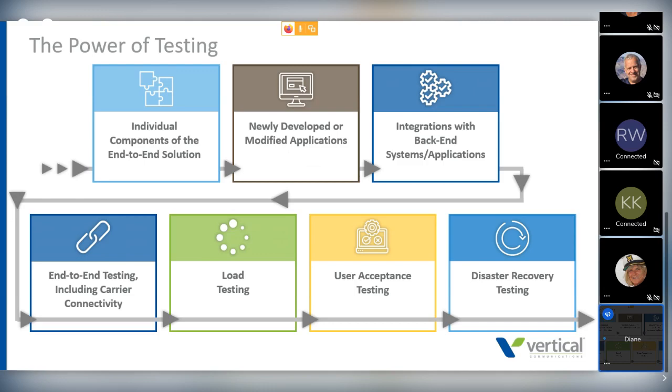Disaster recovery testing. I have seen people go through design and put the most elaborate disaster recovery design in place, but never test it. And then the only time they find out is when the system breaks and you go, oh, shoot, our disaster recovery design didn't work. So it's critical that that be done.